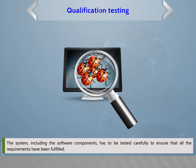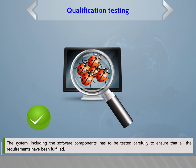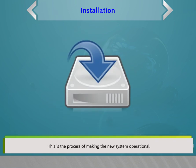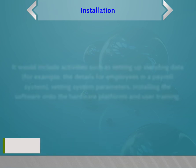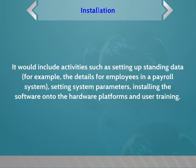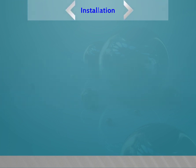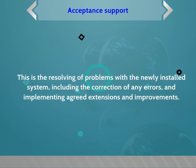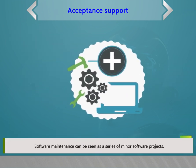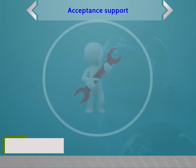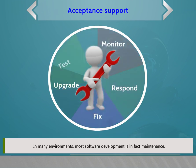In qualification testing, the system including the software components has to be tested carefully to ensure that all requirements have been fulfilled. Installation is the process of making the new system operational, including setting up standing data, setting system parameters, installing software onto hardware platforms, and user training. Acceptance support involves resolving problems with a newly installed system, including correction of errors and implementing agreed extensions. Software maintenance can be seen as a series of minor software projects.